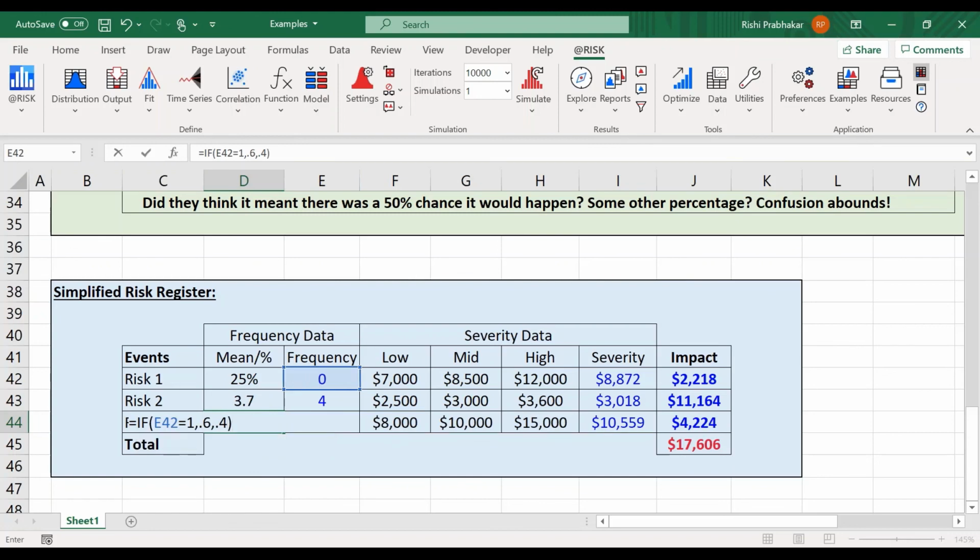So rather than being causal on the frequency, it's now causal on the probability. If this event happens, which is only 25% likely, this event actually becomes 60% likely to occur. Else, if this didn't happen, then this event is only 40% likely to occur.